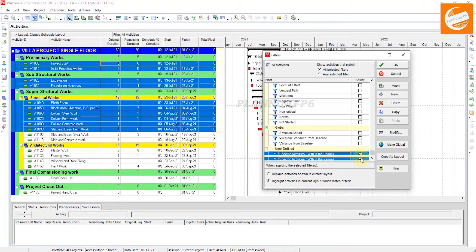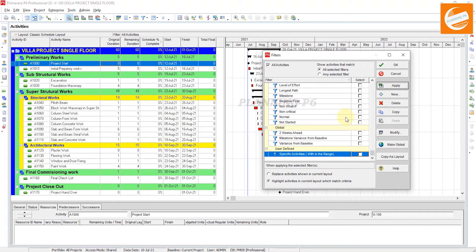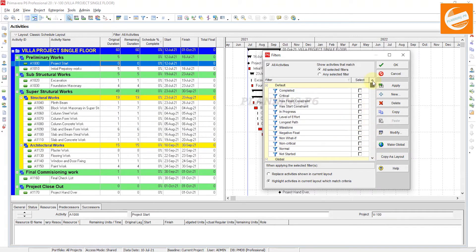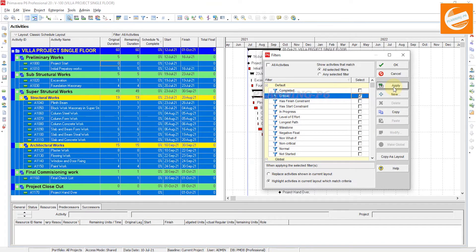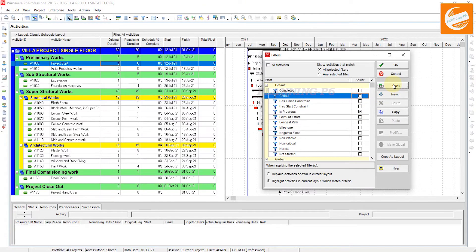You can also apply other filters. If we uncheck this filter and apply the default filters, you can also highlight by other criteria — for example, if you want to see critical activities, check 'Critical' and select 'activities within the current layout.' Apply it and you can see which activities are now critical. If you want to see in-progress activities, you can also apply those highlights similarly.